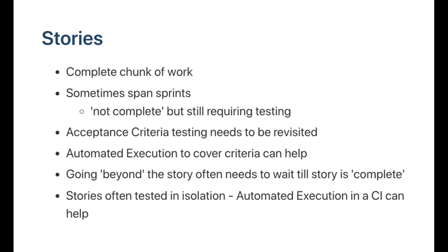To be honest, a lot of Agile planning and processes are a complete mess, but we have to figure out how to handle that in our test approach to help mitigate the risk of omission or commission, like missing something out or doing something that we're not supposed to. That includes making sure that feature toggles work, and there can be a huge combinatorial explosion when we choose to go live with half-finished work that was never designed to be there. And very often it's right at the end where we're squeezed in.